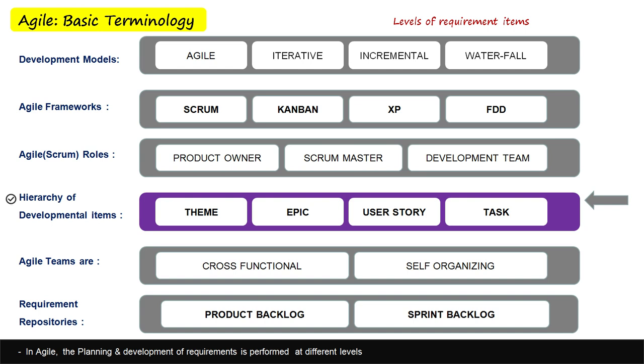User stories are simple functional statements written from the perspective of the end user. User stories are framed so that they can be developed within a span of one or two development cycles, and also serve a certain business need of an end user, with certain acceptance criteria. This is where Agile works so flexibly, simply and compellingly.